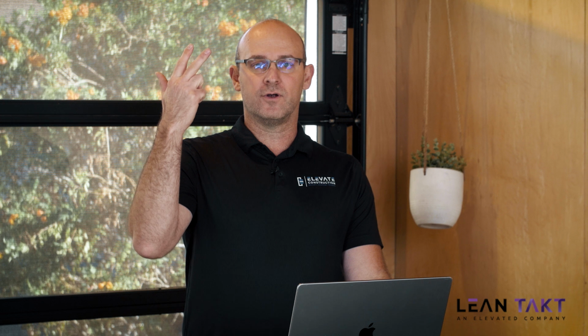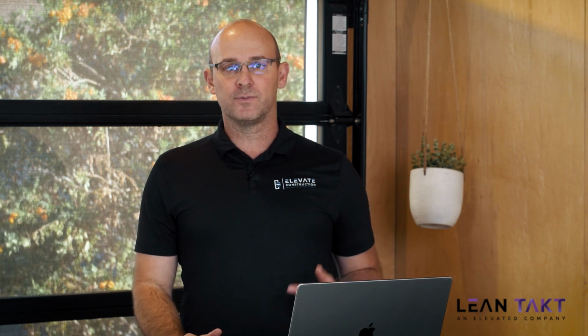That sets you up for the third meeting, which is your trade partner weekly tactical. That's where you do pull plans. That's where you do your look ahead planning. That's where you create your weekly work plans. Now you have the basis to do your daily huddles.